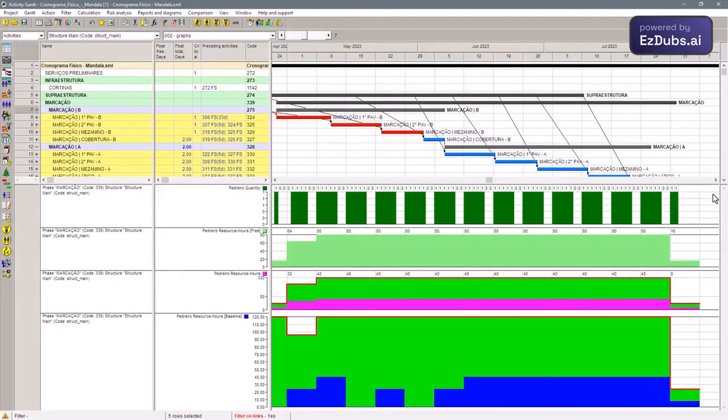This way, in the form of hours, not in the form of money. We will also be able to see the money that would be spent before with the money that would be spent now. It will be the same money because the sum of the costs has not changed, but the light green means unused paid wages.